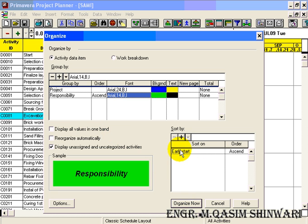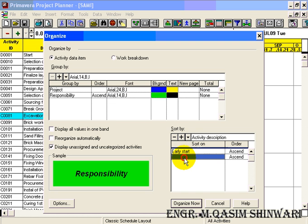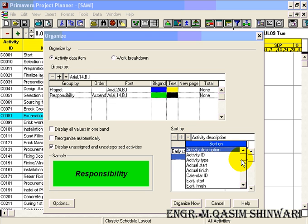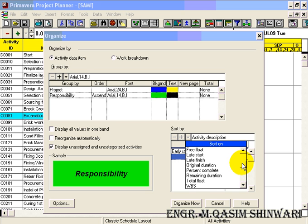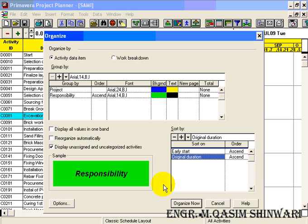And it will also sort by Early Start. We can also sort on multiple bases. I will choose, for example in this case, Original Duration. So first it will sort according to the early start, and after that it will sort according to the original duration. In this case I don't need it, so I am going to delete the original duration, but you can do this.